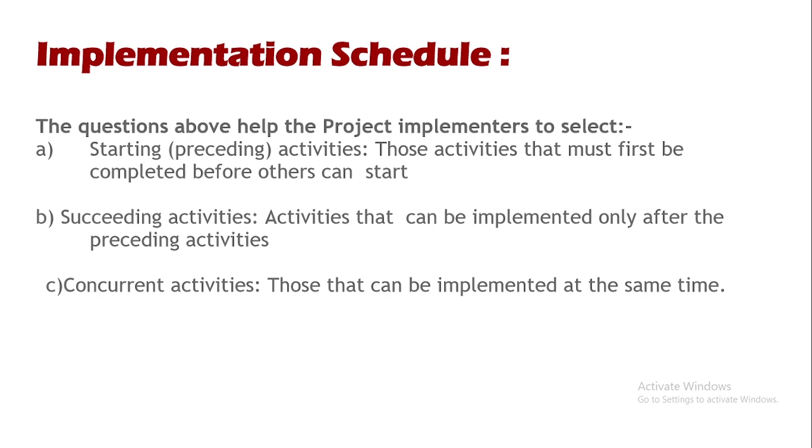So you may decide that instead of having this activity of training in 3 days, we can do it concurrently. If we have 3 trainers, each one of us trains participants from the different districts, and this is done in 1 day. So you're doing that activity concurrently.